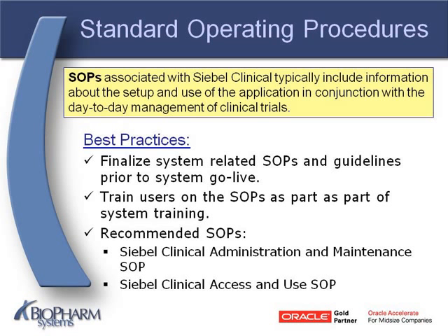The Siebel Clinical Access and Use SOP outlines the roles and responsibilities of system users, user managers, and IT in regards to system access requests, access approvals, and finally configurations. As a rule, SOPs should be finalized prior to go live and should be included as part of your user training.